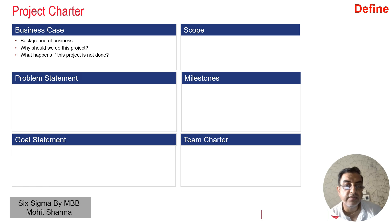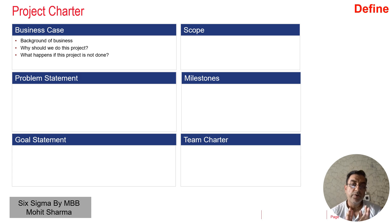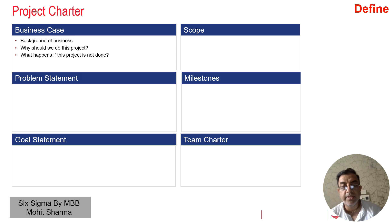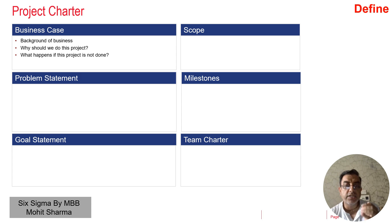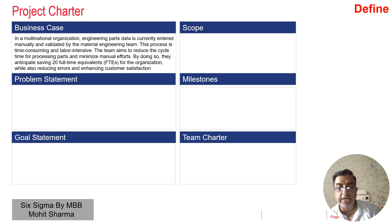The first one is the business case. Business case should have the background of the business, why you want to do this project, and what happens if the project is not done. These three questions should be answered, but not in the form of a question and answer — it should be in the form of a paragraph. Let us look at this business case example.